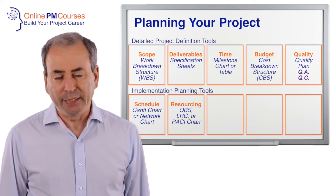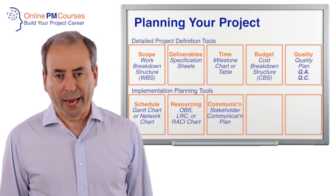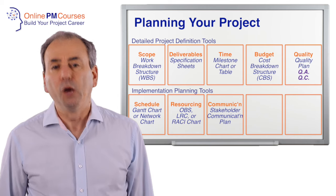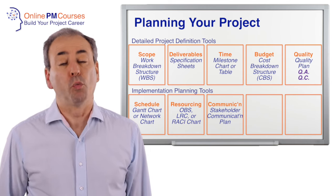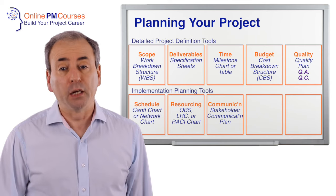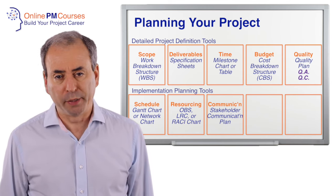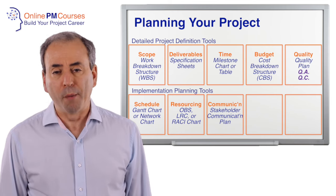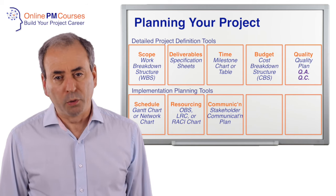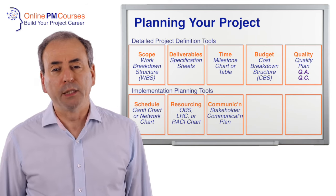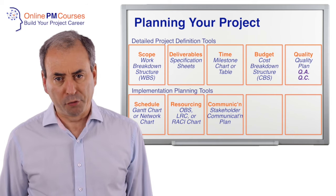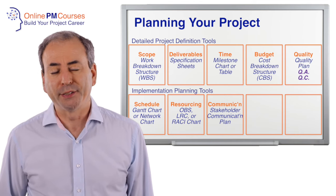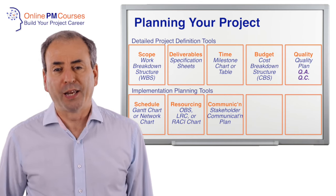Communications is the eighth element of our project plan. Here you need some form of stakeholder communication plan which sets out which stakeholders are going to receive what communications, at what times, using what formats, and allocating responsibilities. A stakeholder communication plan is not difficult to draw up in principle — the hard work goes into thinking about precisely what message needs to be delivered and how best to deliver it, not forgetting that tone of voice, whether written or spoken, is crucial to communicate the message effectively.